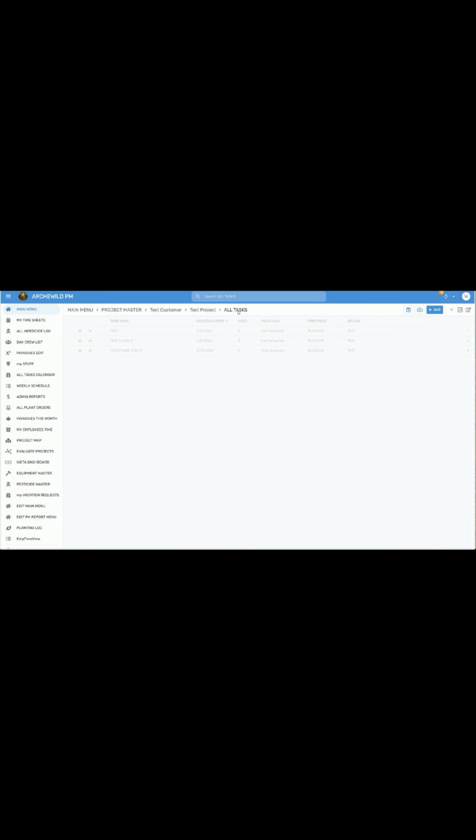All right, the hide copy split button is still active, but you can see that the split button, well, that's because down here, it's a 5-day long task. The number of split days has not yet been selected. So let's just say I want to split off 2 days. Okay, click the task split action button, confirm, and come back, and now you can see that that original 10-day task has now been split into a 5-day task, a 3-day task, and a 2-day task.